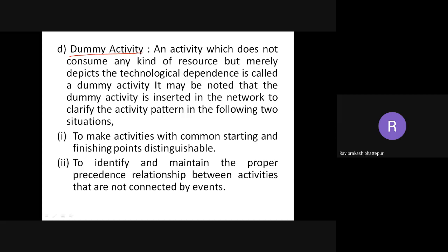You might remember what an activity is. An activity is something which has a beginning and an end, and which uses certain kinds of resources. So what will a dummy activity mean? A dummy activity will not consume any kind of resource but merely depicts the technological dependence. When we are solving the problem, we'll understand why and where we are using this dummy activity.